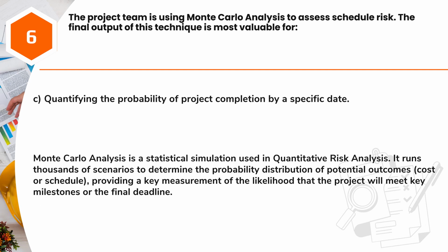Answer C. Quantifying the probability of project completion by a specific date. Monte Carlo analysis is a statistical simulation used in quantitative risk analysis. It runs thousands of scenarios to determine the probability distribution of potential outcomes, cost or schedule, providing a key measurement of the likelihood that the project will meet key milestones or the final deadline.